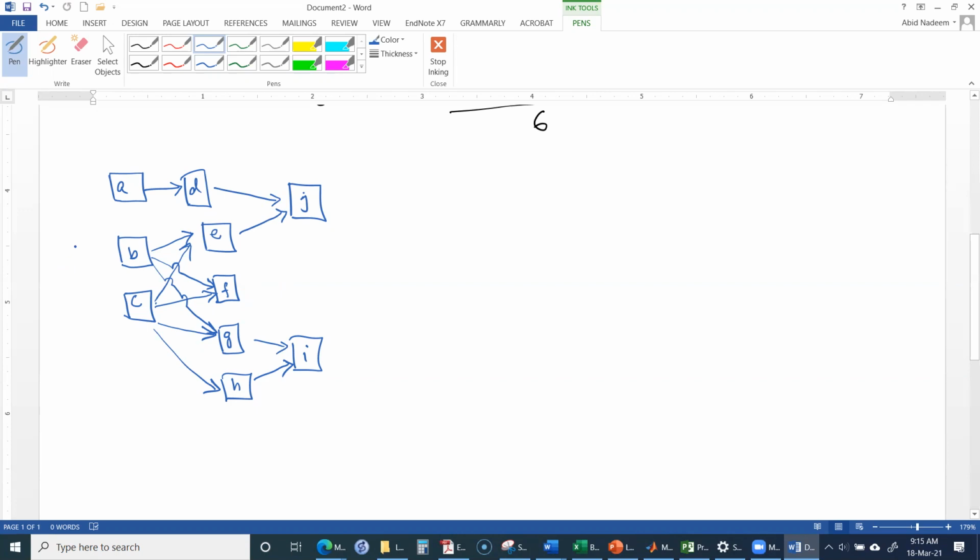So just for clarification, I can draw a project start milestone to link these activities A, B, and C with them. This shows that project start is not an activity, it is just a milestone. And then similarly, I can draw, for clarity purposes, a milestone.